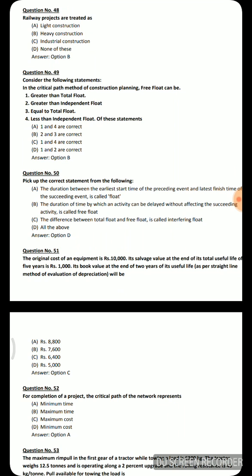Next question: in the critical path method of construction planning, free float can be — statement 1: greater than total float; statement 2: greater than independent float; statement 3: equal to total float; statement 4: less than independent float. Statements 2 and 3 are correct, so option B is the correct answer.